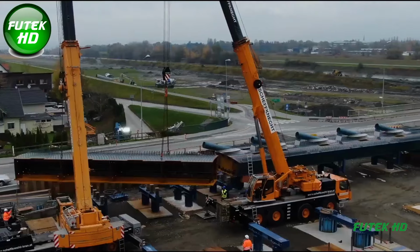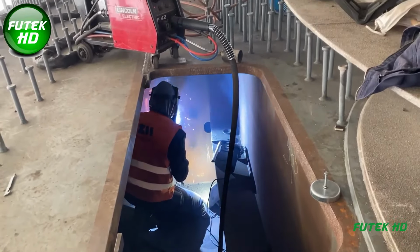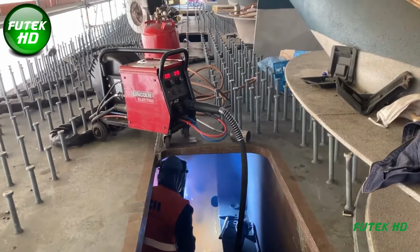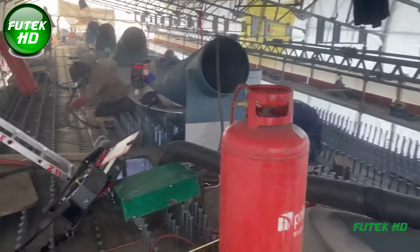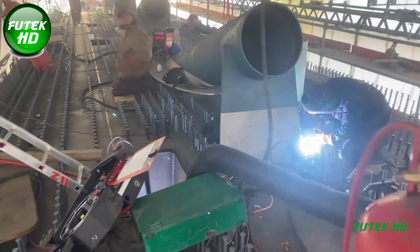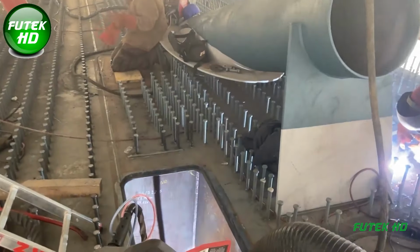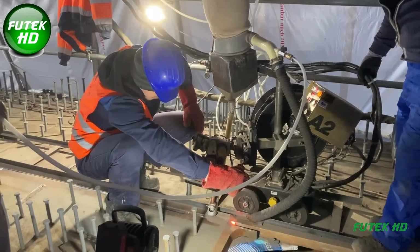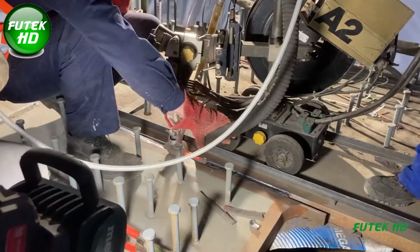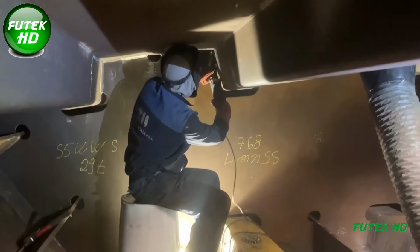Initial preparations and setting up the construction site commenced in June 2020 with groundwork to establish the assembly site. Given the Rhine's seasonal flooding, it was crucial to carry out much of the work during periods of low water discharge in winter. By September 2020, significant strides had been made in constructing the substructure on the Rhine's foreland. This substructure forms the base for the bridge's pillars, facilitating the load-bearing capability essential for a steel composite bridge designed to withstand increased river discharge.